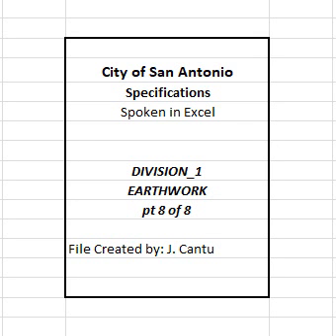Where subgrade is constructed under this contract, correction of soft spots in the subgrade or existing base will be at the contractor's expense. Where subgrade is not constructed under this contract, correction of soft spots in the subgrade will be in accordance with pertinent items or as agreed upon with the city through the change order process. Asphalt used solely for curing will not be paid for directly, but will be subsidiary to this item. Asphalt placed for the purpose of curing and priming will be paid for under Item 202, Prime Coat.